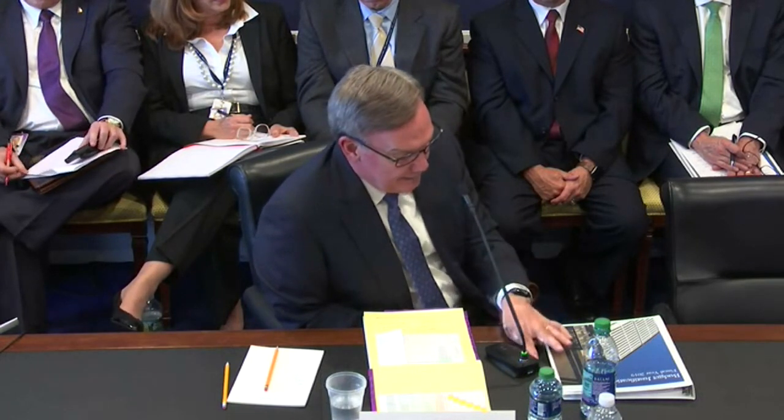When we last looked at the Rayburn building, it was a several billion-dollar project. And so, we're not poised to do, nor is the Congress poised to fund a project like that. So we've got to find a different way to go about that project and break it down perhaps into smaller pieces or do different mechanical systems at a time, whether we do it horizontally by floors or whether we do it by wing. We need some help figuring that out.